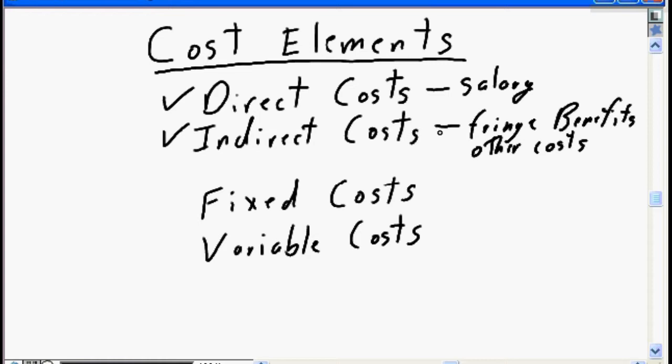What about the time for the purchasing agent to go out and negotiate a deal? What about the transportation costs to receive the material? What about the storage costs and the receiving costs to receive the material into your organization and potentially store it for a period of time until it's used by your project? So again, you need to consider what costs should be incurred, should be borne, should be addressed by your project.